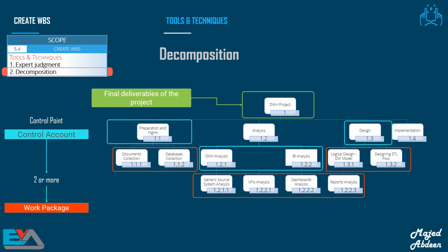With the WBS, you can easily break down the work into work packages, and the WBS shows how the work packages are derived. There's an added benefit to creating the WBS too. The process of creating a WBS allows you and your team to work through the project in your minds, and so it improves the project plan. The execution of the project should be easier and less risky as a result. All the elements of the WBS don't need to be defined to the same level.